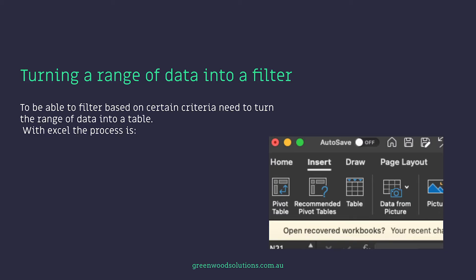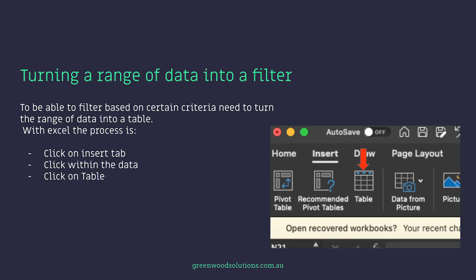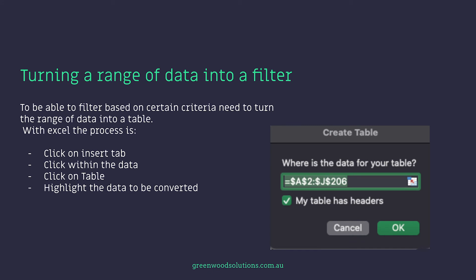You've opened your spreadsheet, put some headings in columns, and then you run down the side in the rows the various tasks. Now to get more out of this information, you have to convert that range of data into a table. With Excel, which I'm using, the process is as follows: click on the Insert tab, click within the data anywhere within the data, click on Table, highlight the data to be converted, check My Table Has Headers, and then click OK. You now have a filterable table.